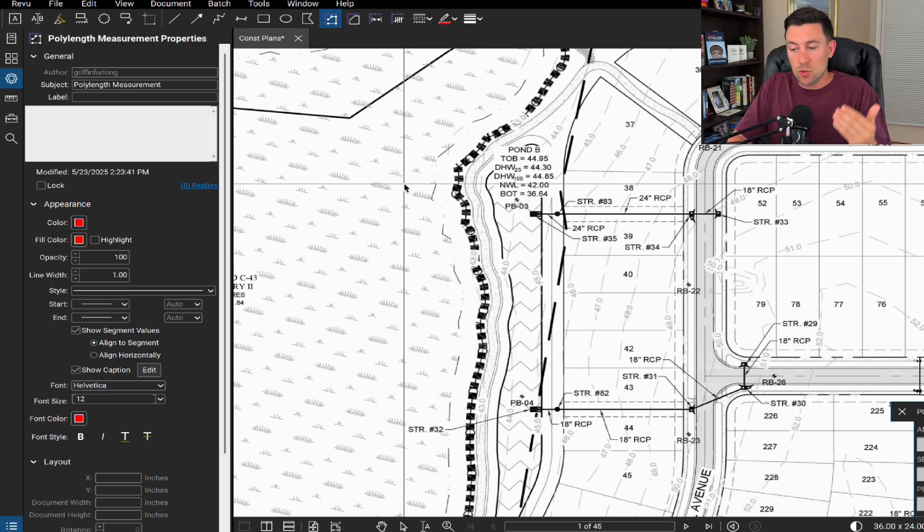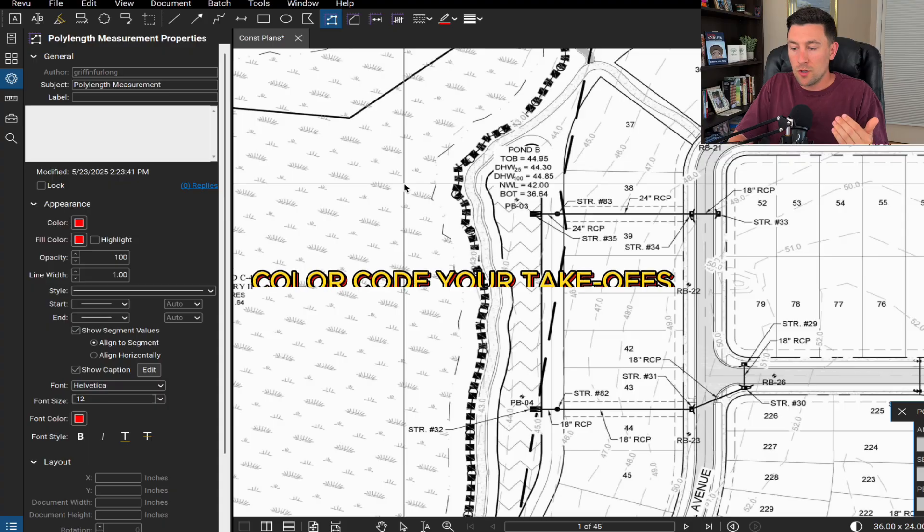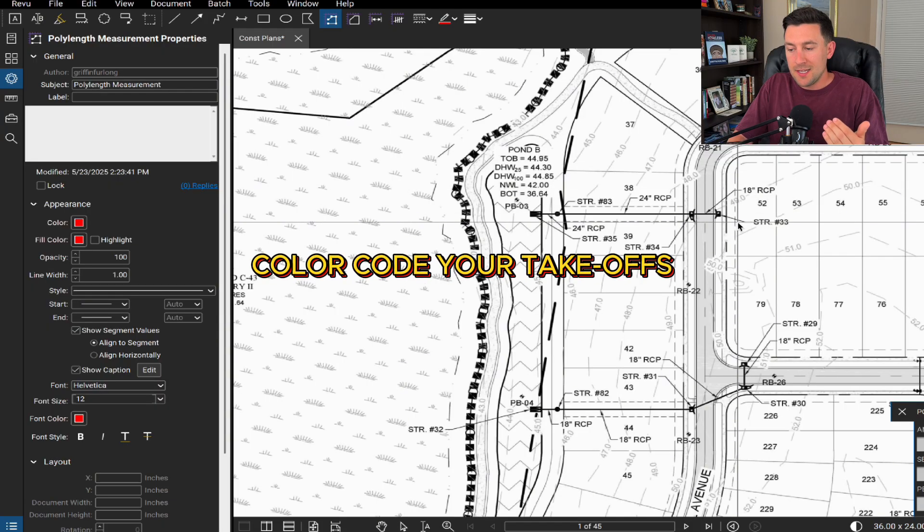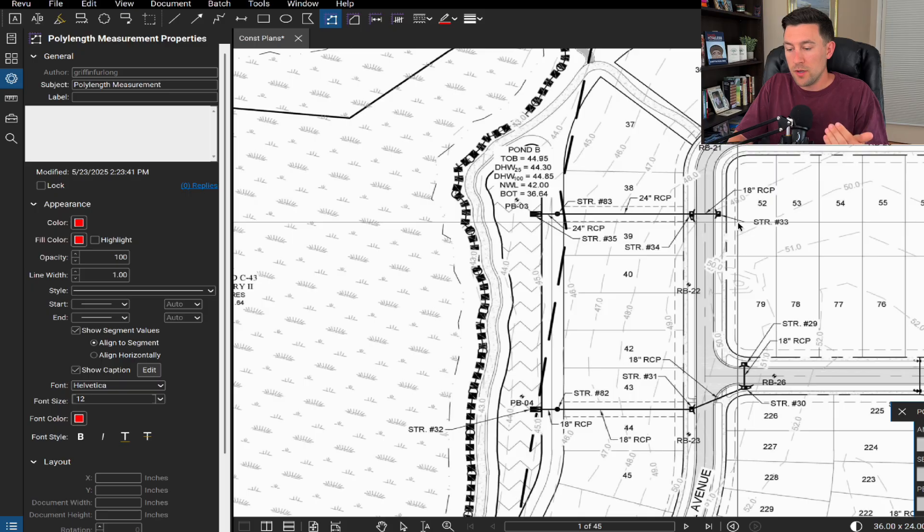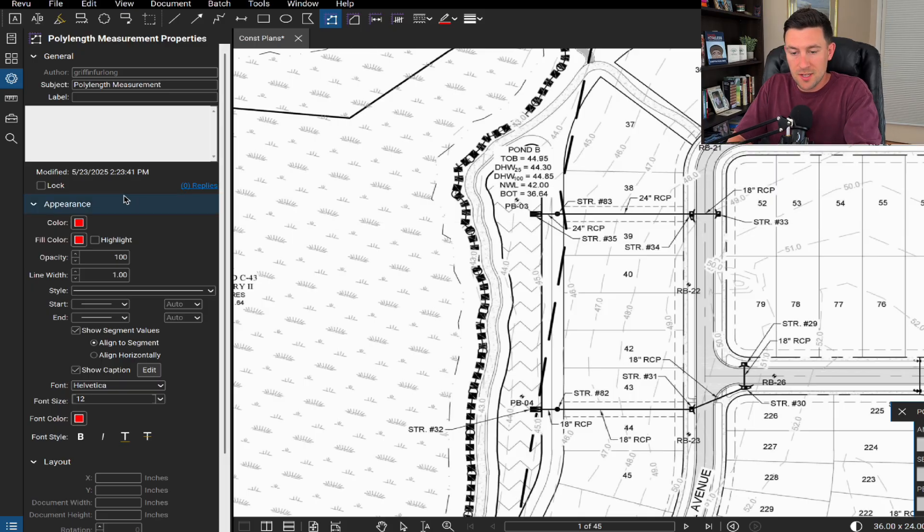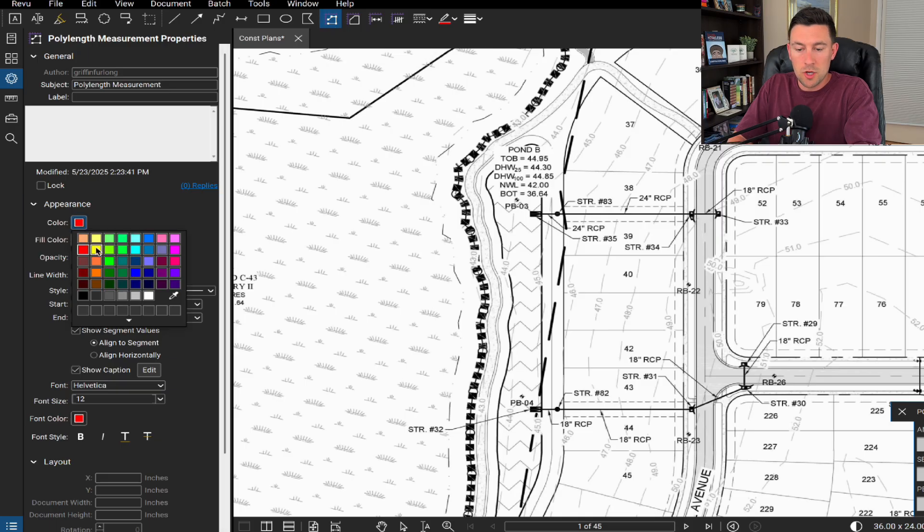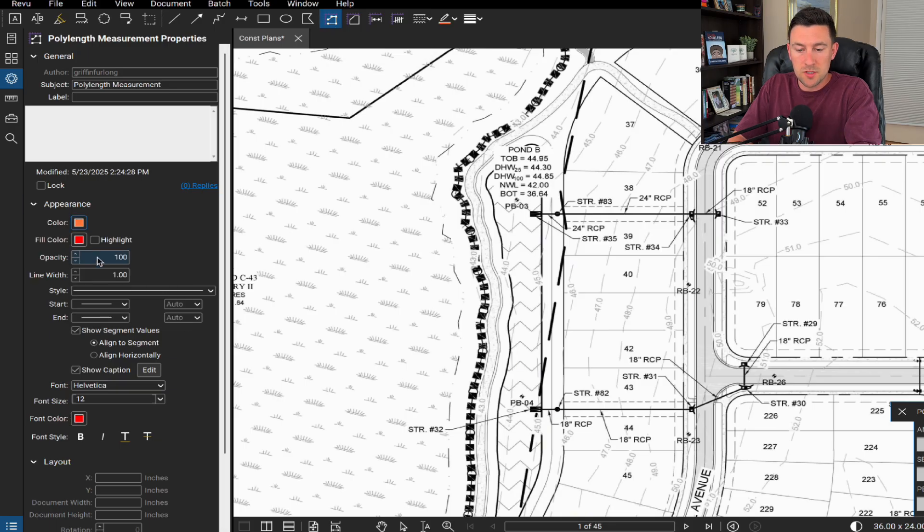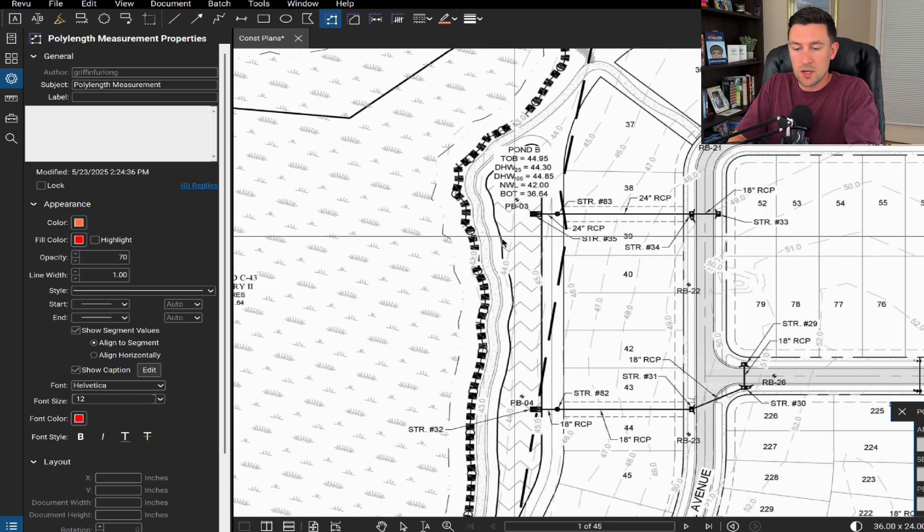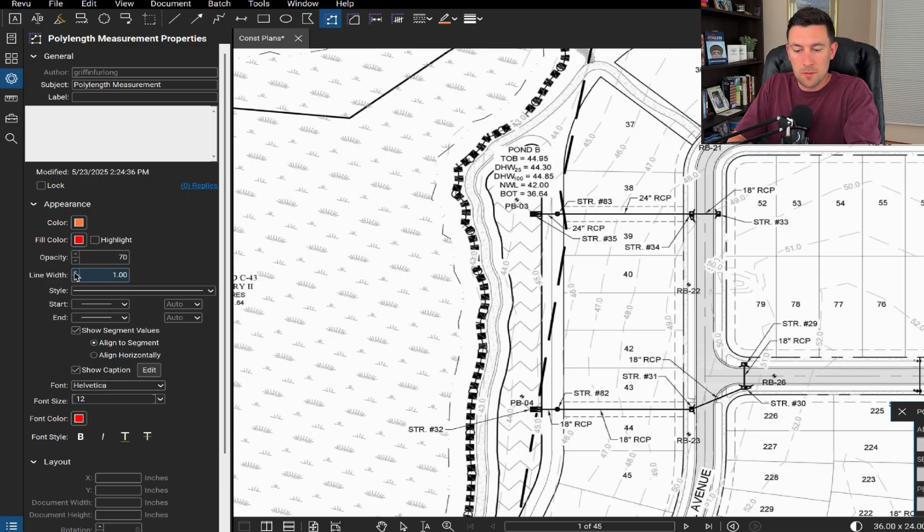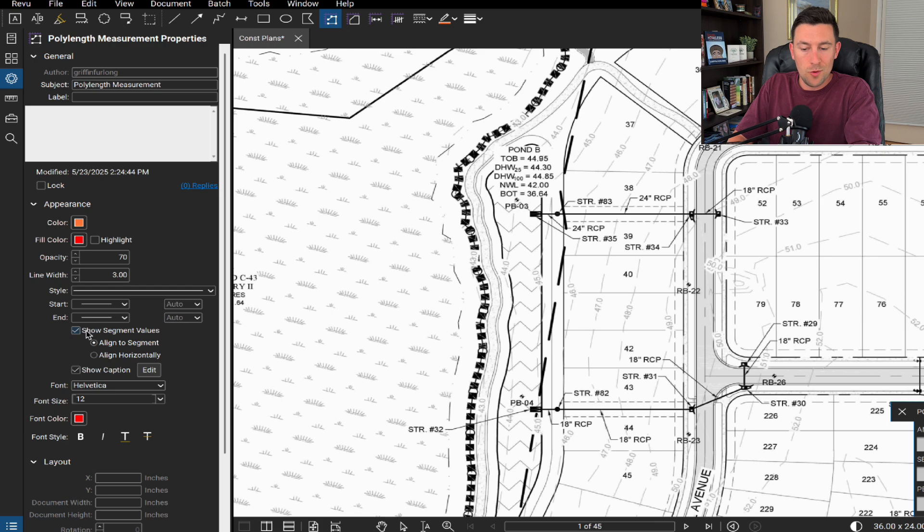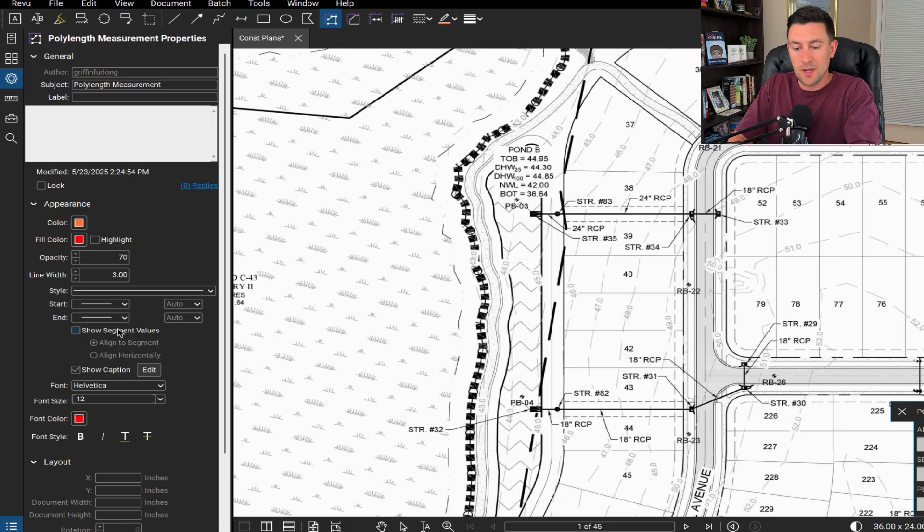Now I think organization is key and setting up a story is key. So for different size storm pipes, I like having a color code system. So for 18 inch RCP, I'm going to use orange. And then for 24 inch, I'm going to use green. But let's first just set some of this stuff up. So again, I have poly length set up, I'm going to go to a color, I'm going to select orange, the fill color doesn't matter. And I'm going to set the opacity a little bit lower, just so it serves more as a highlight and it doesn't cover the entire drawing there. I'm also going to increase this line width just a little bit. Now I don't want to show both the segment value and the caption because then it'll duplicate on itself. I'm going to delete the show segment values and then I'm going to just show the caption right there.